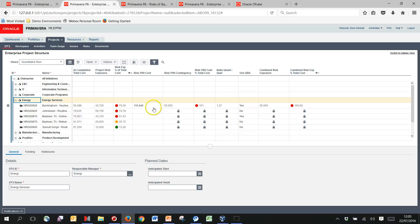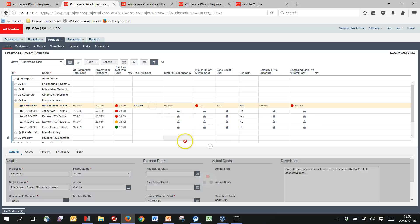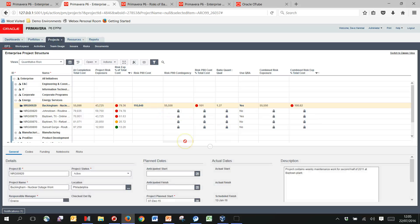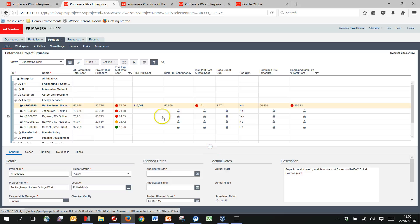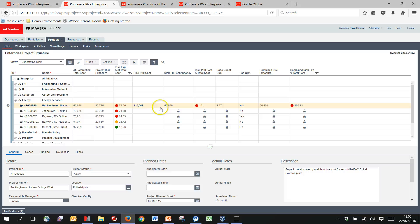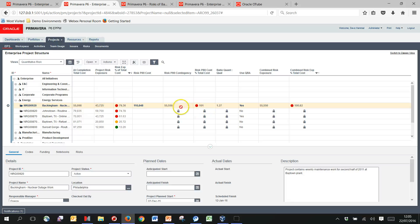So I've done this for one project so far. I can see for Buckingham I've got my P80 risk cost and then I've got my P80 contingency. So the P80 contingency, it's just the P80 cost minus the at completion. And then we've got the similar percentage, this time we're looking at the percentage of the P80 contingency over the total cost. It's roughly the same, so it's roughly 100%, slightly over 101. So in this case we can see that our quantitative value is actually 1.27 times bigger than the qualitative value.